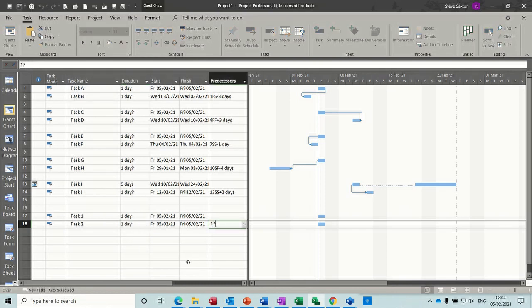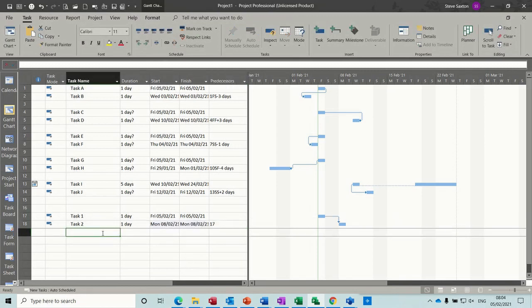So start off with 17, but what you need is a 5-day drying time. So say that is pour wet concrete, and this one is to establish a building frame on that concrete. What you can do is a lag on this of 5 days, and then it will show a critical path.